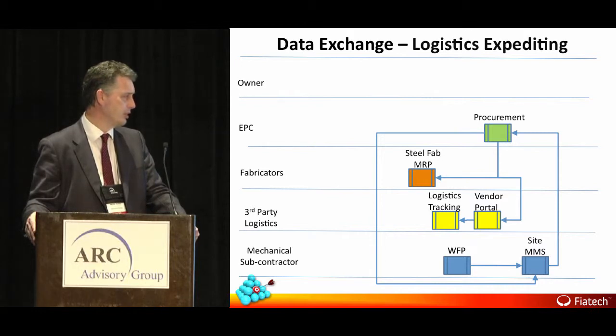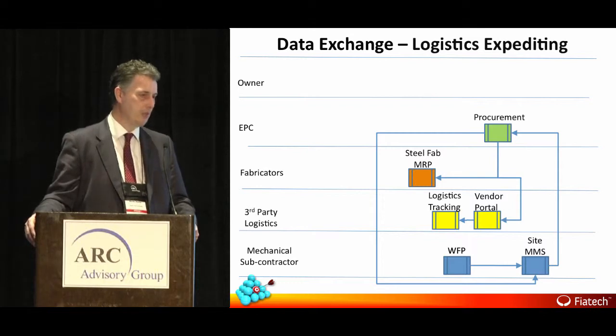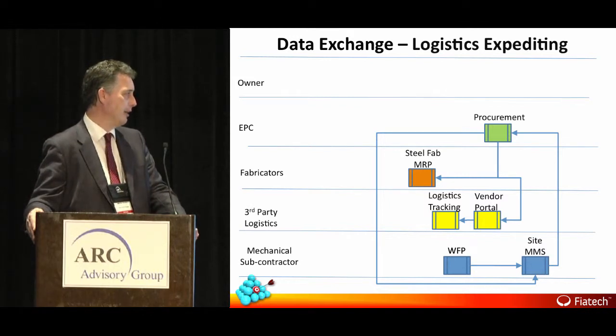So we see that as a great aim of people not wandering around looking for materials or starting jobs or opening up work fronts just driven by materials management. So it's very much, we don't deploy people to site until there's actually the work that we can get, open up the work fronts according to the plan.